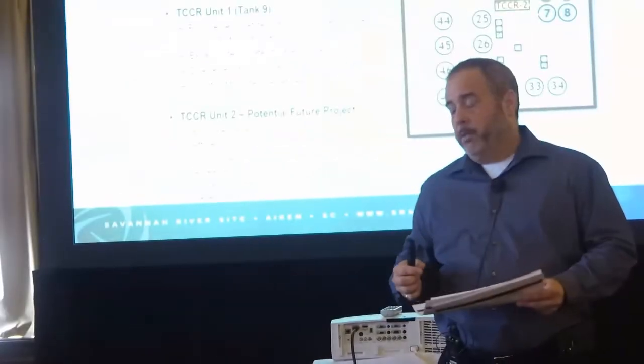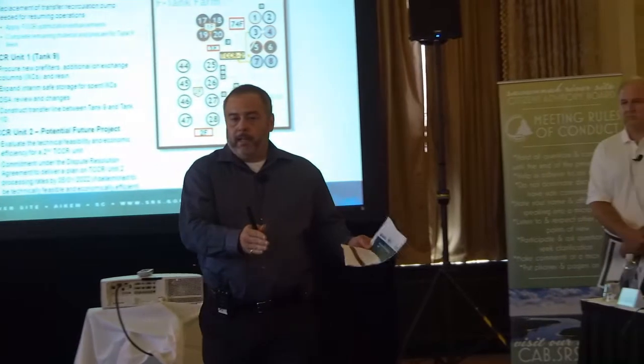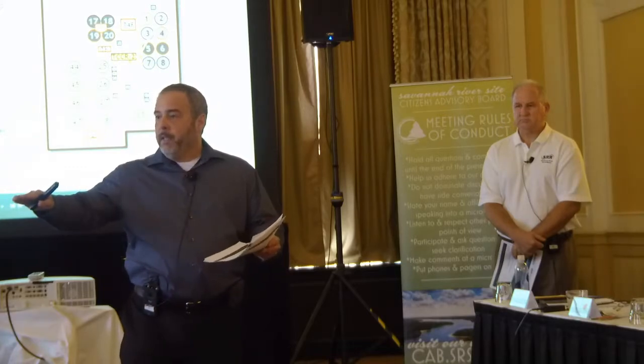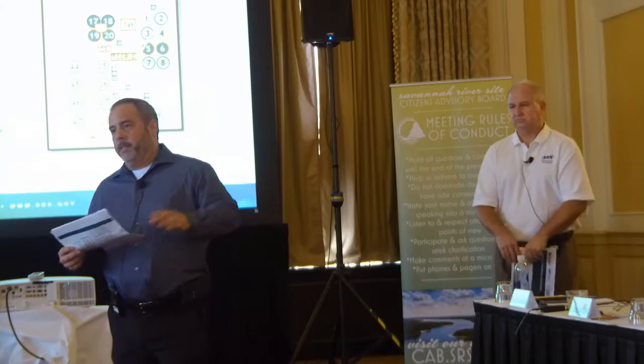The second piece of that is in the future. I mentioned that we have a due date for a processing plan for a second unit if it's determined feasible by May of 2022. So we have to do a feasibility study that looks at whether it is worthwhile to build the second unit in F Tank Farm and have that all done, and if it is, have the processing plan done by May of 2022. So it's just a little bit different. There are some different pieces in each one.